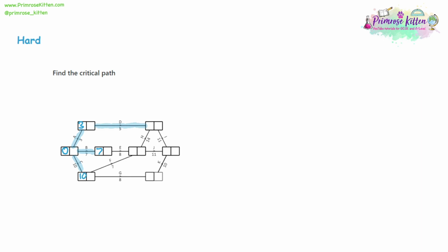3 plus 5 is 8. 7 plus 8 is 15. 10 plus 7 is 17. So you can see the value of highlighting the lines we're doing, because we're then not forgetting to do lines and identifying changes like this. G is 8, so 10 plus 8 is 18. And see, I'm roughly working from left to right.